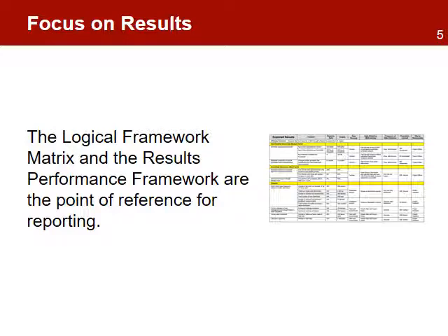Results are the common point of focus for reporting. The logical framework matrix and the results performance framework are the point of reference for reporting. The report identifies what has been promised in the log frame and performance framework during the planning phase and compares it with what has been achieved. The report indicates how the project is progressing during the implementation in terms of actual results stated as outputs and outcomes.